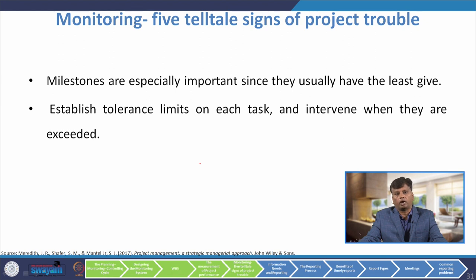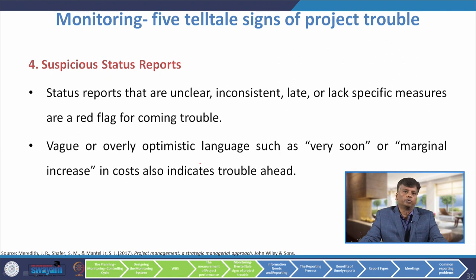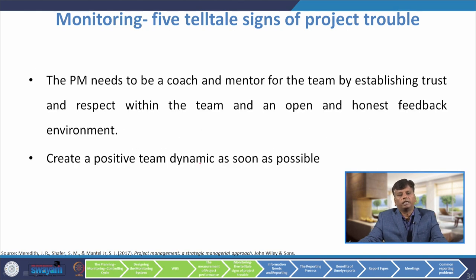If you do not have a detailed project schedule, the chance of the project failing increases exponentially. Milestones are especially important since they usually have the least flexibility. Establish tolerance limits on each task and intervene when they are exceeded. The fourth indicator is suspicious status reports — status reports that are unclear, inconsistent, late and lack specific measures are a red flag. Vague or overly optimistic language such as 'very soon' or 'marginal increase in cost' also indicates trouble ahead. The fifth sign is discord and drama. Unhappy team members can cause major trouble. Meeting minutes can reveal members who are consistently missing, have low participation, or have excessive objections. The project manager needs to be a coach and mentor, establishing trust, respect, and an open feedback environment.